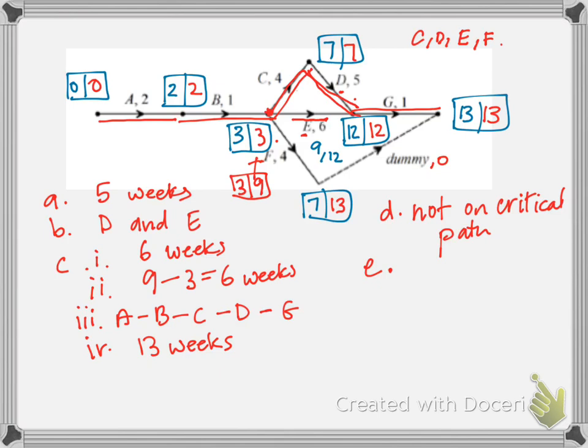Let's start by reducing C and D, the maximum they've allowed us. They've told us 2 weeks per activity. So if I reduce C and D, and let's say I make C 2 and I make D 3, now that's 5. But unfortunately, look, E is 6. So is there any point in reducing both of those by 2?